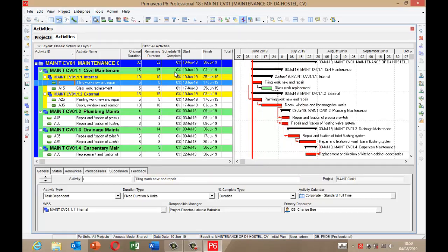All right, so this is a copy of your project in the baseline. When you're updating, you update the original project, okay, but you still have that copy somewhere. So when you want to forecast, or you want to compare planned work with actual work, then Primavera will pull out the baseline and compare with the actual work done.